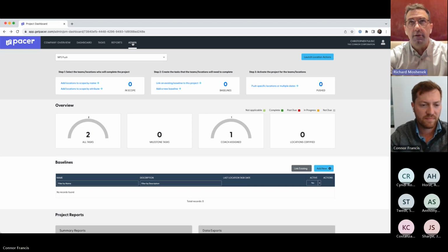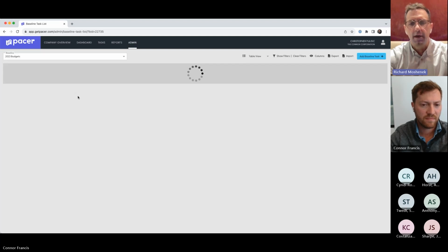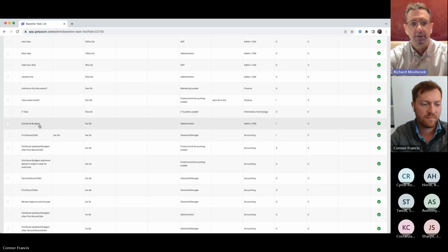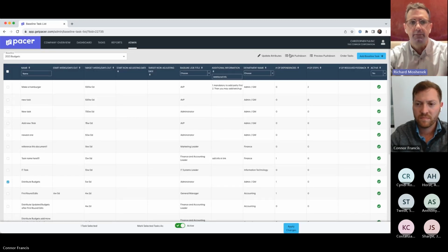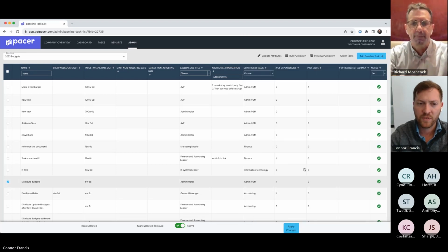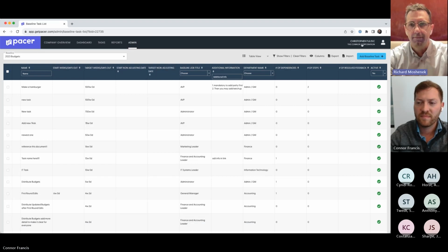Great, and I think the only thing I should clarify there is that if they went into the baseline and made an edit to a baseline task that's been pushed to every location, that will still update every single location. But if they went to a project and were trying to change a start date or something of that nature, they're only able to edit a start date or push projects down to locations they have access to. So it kind of depends on what they're doing. Great question. I was talking about editing a task, not adding it. Yeah, cool. Oh, editing. Yeah. Cool. Thanks, Connor. Yeah, of course.